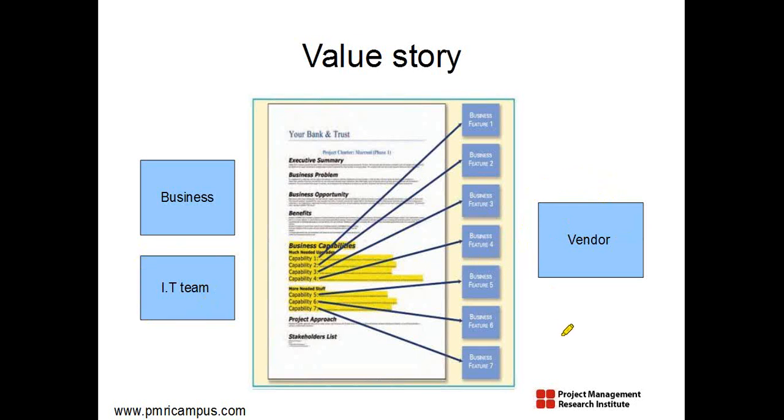The costing should be based on value story. And sometimes we can even talk about, hey boss, don't give me any money for the project, but I want 20% of the savings from the project for the next 3 years. So if the customer is game for it, fine. So he also wins. I will not give you any money for the project, but then we are talking about partnership. Just the cost alone I'll take. The profit part I'll keep with me. And the profit is nothing but maybe 10% of the revenue saved by implementing the solution for the next 3 years. So that way sometimes you'll make tremendous money.